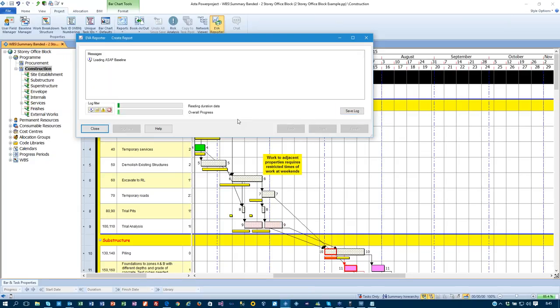And what that's going to do in the background is now running analysis on my project, doing any temporary reschedules it needs to work out the values and placements of my activities. And as it runs through there, it's generating this data that I can then use as an S-curve. It almost becomes part of the process that you can do this every week. As I stand, we have a number of clients now that export this as a standard report to management along with their project plan and drop line report. So it's a very simple way to see things.